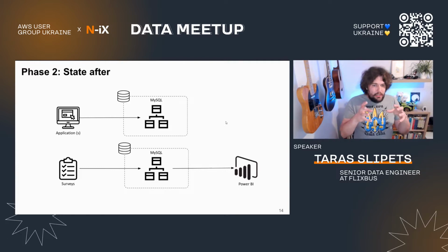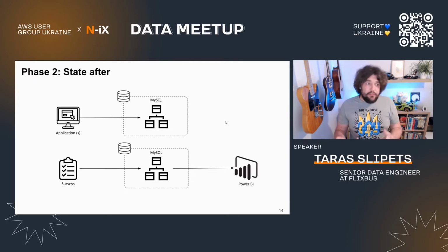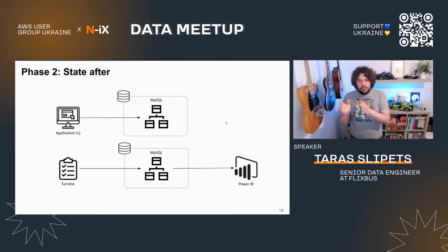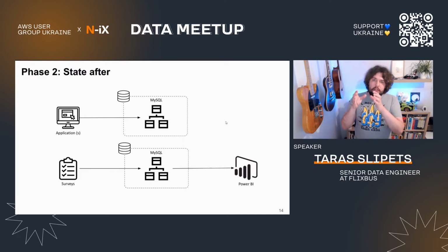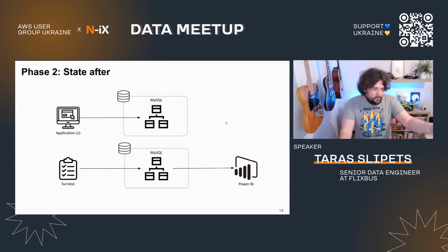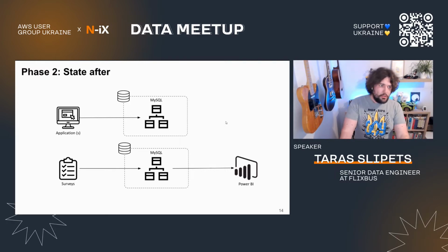And also, why I split it into those 5 steps, 5 phases, is that any 2 consecutive phases are easy to roll back. They are incremental. So it was always a safety net, a safe, clear rollback process if something goes not as expected. So this is exactly like that. We split it, but we still had quite an easy option to get back to where we used to be before.